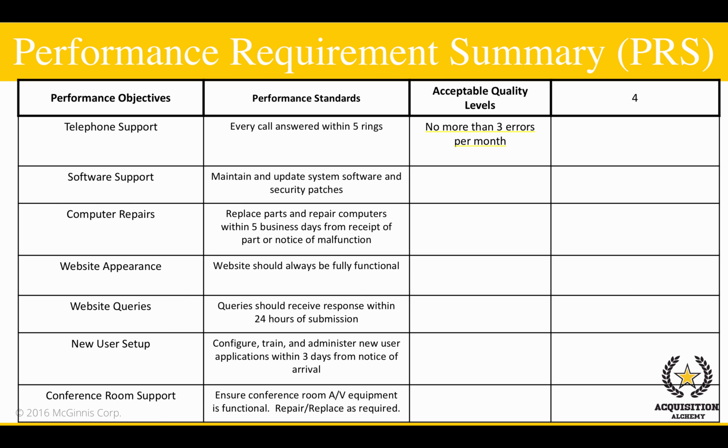Software support is more mission-critical because it affects all of the computers on the network and involves security issues. So if you remember, we didn't quantify or assign numbers to this performance standard. Well, we are compensating for the lack of performance standard specificity in the AQLs by assigning a 100% compliance and attaching a 0 security incident threshold because of its critical nature. On new user orientation, new users must be set up on their computers within 3 days from the notice of arrival, 99% of the time. Again, not too critical, but it has the commander's attention, so naturally it has an increased level of importance.